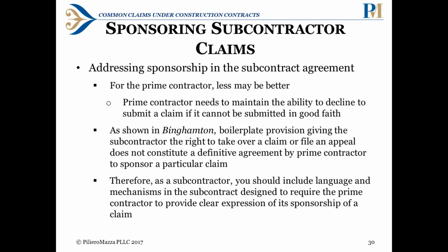And one more thing, with the certification requirement for sponsoring subcontractor claims, the prime contractor is going to be the one that must include that certification when the claim is over $100,000, even though it's sponsoring the subcontractor's claim. The prime contractor is making that certification to the government, so the prime contractor will want to include a similar certification from its subcontractor in the subcontract.